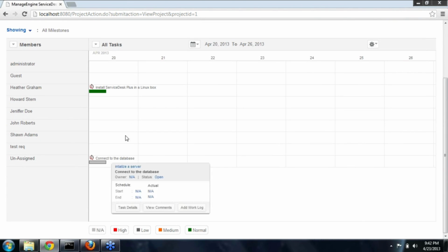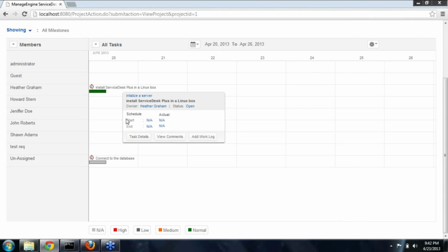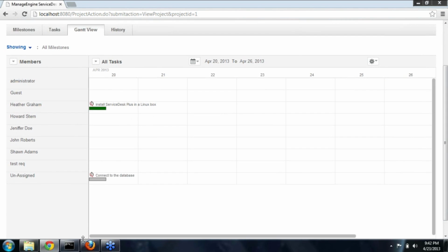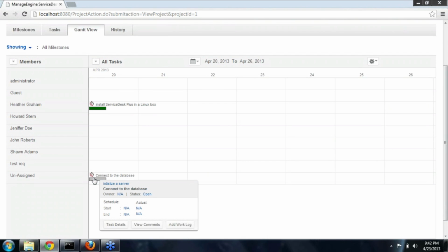Gantt chart. The Gantt view in project management will provide the list of tasks that have to be executed within a particular time scale. This will give a project manager or a project administrator an overview of the project status within a specific time scale. For example, if you have two tasks that have to be executed in two different time frames, and it will involve downtime in two different time frames, in such cases you can overlap the two tasks and ensure that you execute the tasks within one downtime, thereby ensuring the quality of service that you provide to your users.